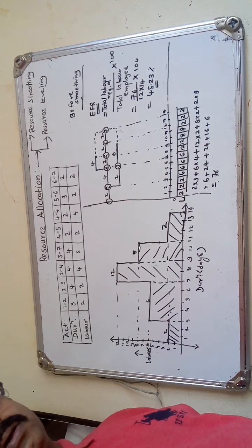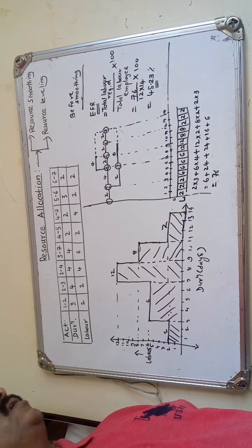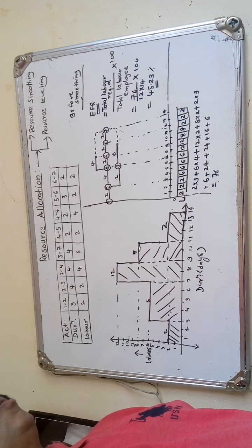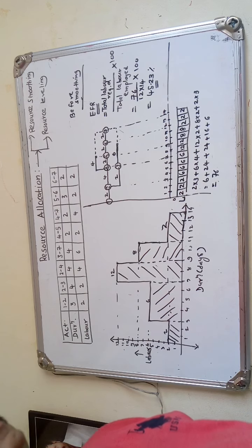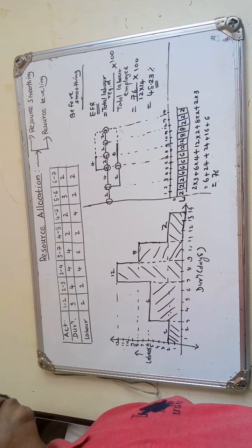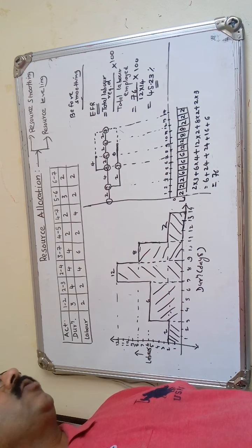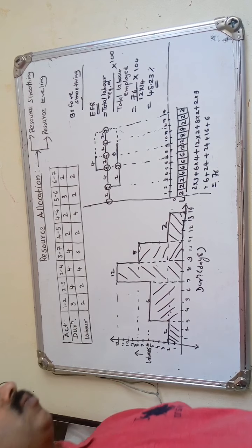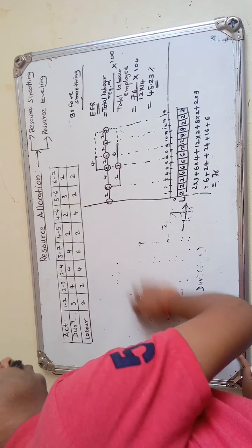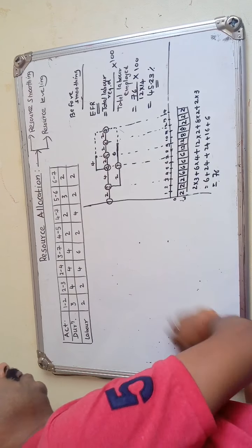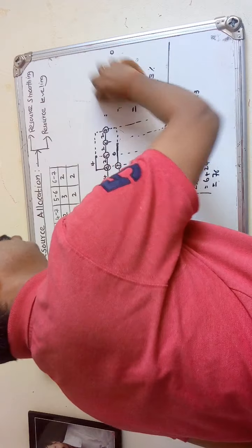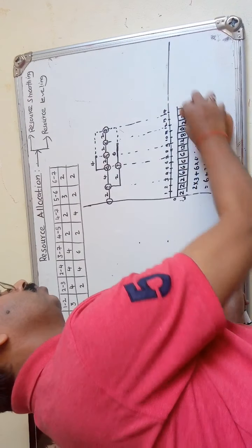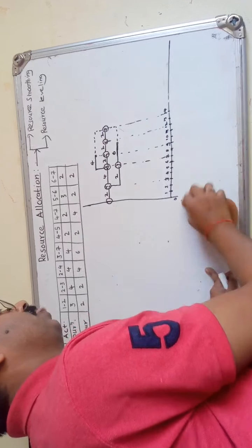Now coming to the resource smoothing technique, as I told earlier, you have to use the available float of non-critical activities intelligently. You can shift the start or end time of an activity and try to make the demand somehow uniform. Earlier we got a maximum demand of 12, and this 12 we have to reduce. So how to reduce it? Now we have to focus on the non-critical activities: how the demand can be changed.